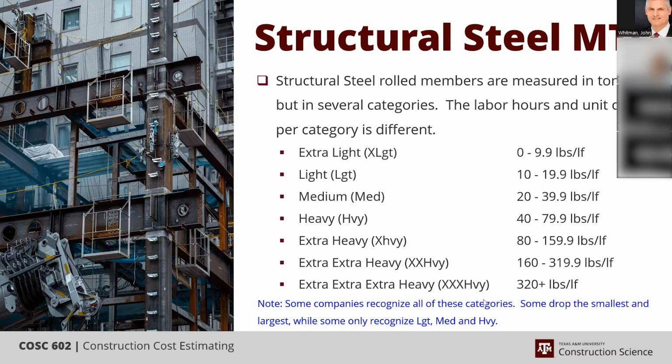I will have to back up and make one exception, and that is usually when you get into the extra heavy category, you may be looking at a girder and not a rolled member. That's exactly what I was thinking of. This is why in my mind it costs more to build. Yes, it will. You're going to rent an 80-ton crane or something to put it on.